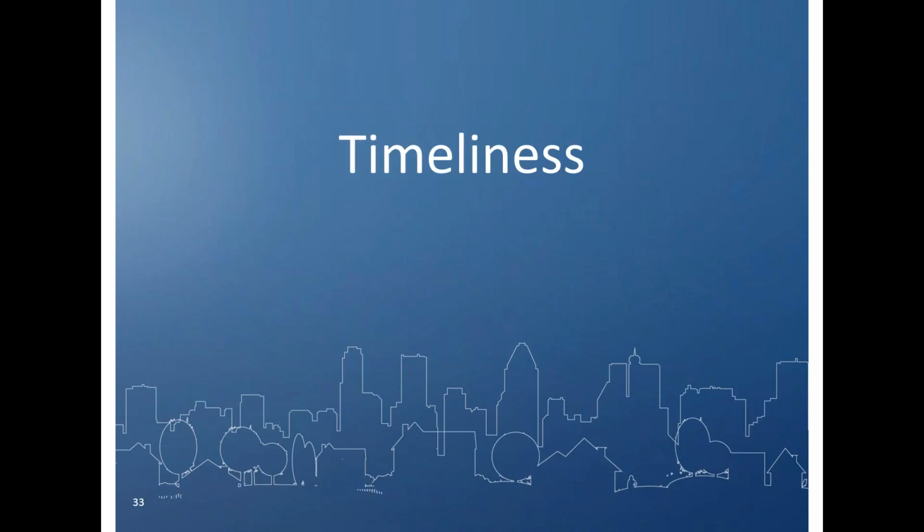Again, there's a DRGR webinar coming up in a couple of weeks, so if you have follow-up questions about how to do that in DRGR, they can certainly walk you through that. But that would be the minimum level of specificity. The more precise is literally site by site, homeowner by homeowner, and that's up to you to decide what level you want to do it at. It's not sufficient to just do it at admin and activity delivery, those great big buckets, because then you won't know in DRGR how to attribute those costs to the particular activities.